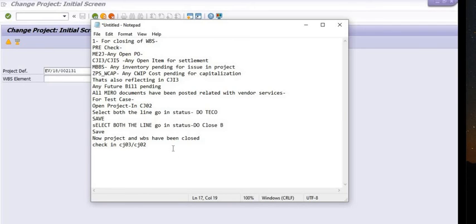To summarize the WBS closing process: check that no purchase orders are open, no cost is pending for settlement, no inventory issue is pending, no CWIP is pending for capitalization, no unsettled cost exists, no future running bills are incoming, and no MIRO is pending for payment. You can check this report in CN41. Thank you — if you have any queries, mention them in the comment section or reach us at erpsapteam1@gmail.com.